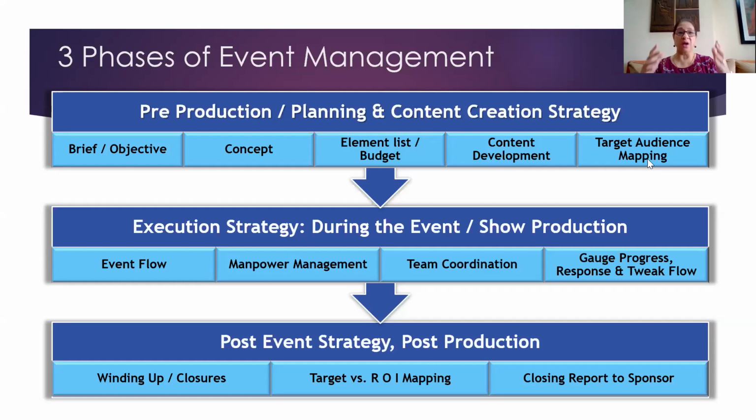So how are you going to do it? The planning process for a marathon is a good 4 to 6 months. The advertising, creating the hype of the event itself, starts 3 months in advance. So we have our media plan in place and all the ads coming out. This is a hypothetical example for one event, but you can apply it to other events. Whatever advertising you've done, radio spots, hoardings, print ads, all that has to be collected and pasted onto a nice page, in ready-made folders, and you make your report on that.